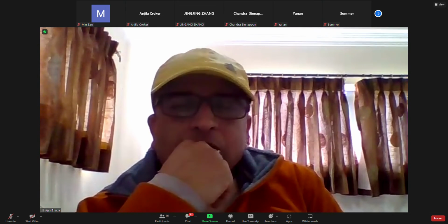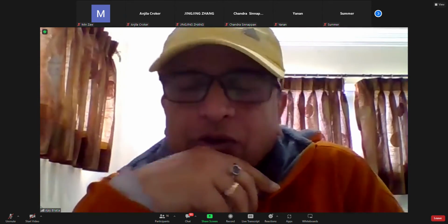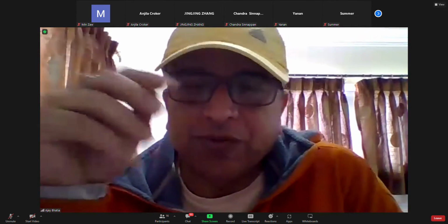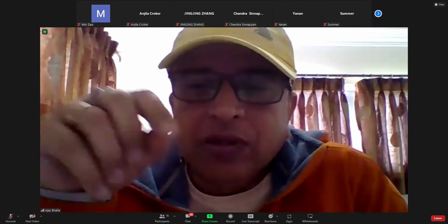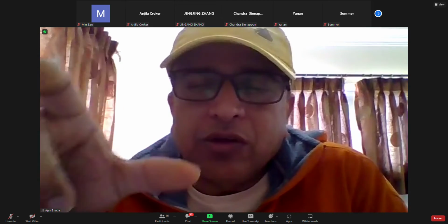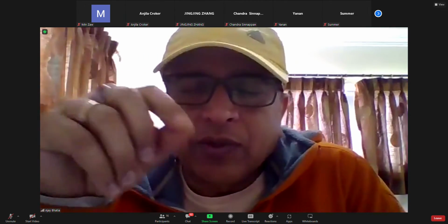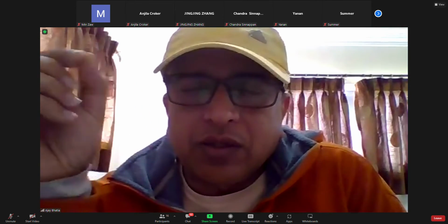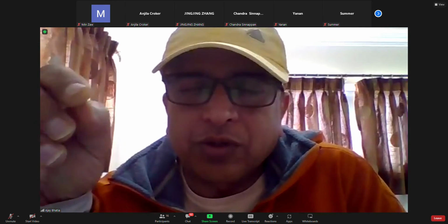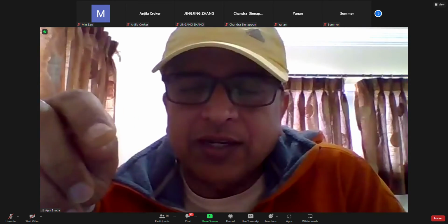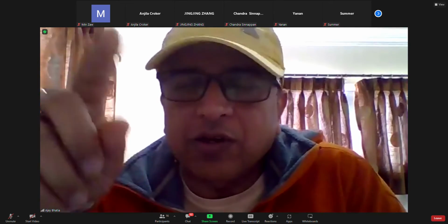If it is 410 UB 60, that means your weight is 60 or close to 60, 59.6 or 59.7, so it is rounded up to 60. If your UB member is 10 meter long, the length is 10 meter, and in the conversion factor you put the weight as 60. So 60 into 10 becomes 600 kgs. You don't have to calculate the girth.